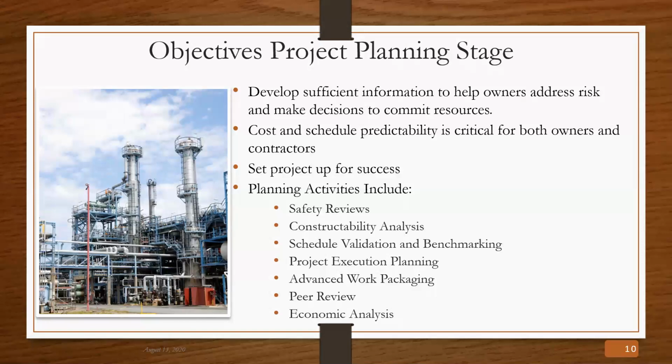At the end of the planning stage, it's also good to take another look at the economic analysis to make sure that the economics of the project are still as robust at the end of the planning stage as when you conceived the project.